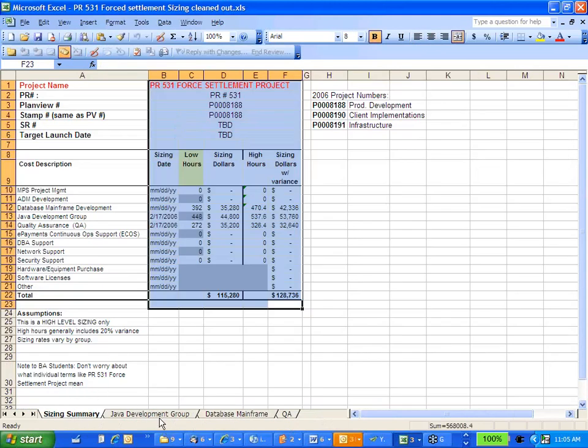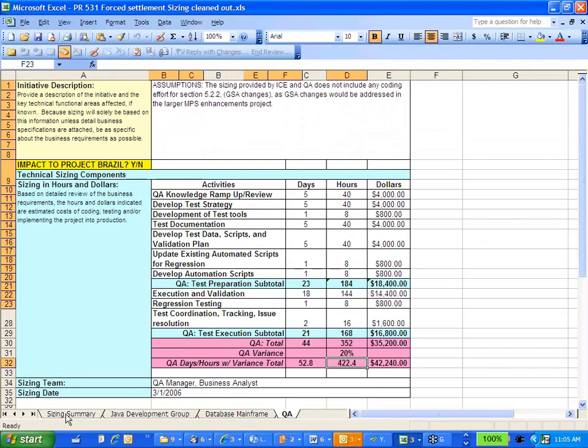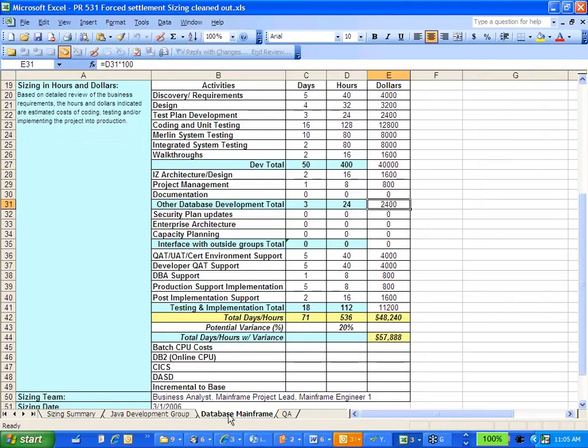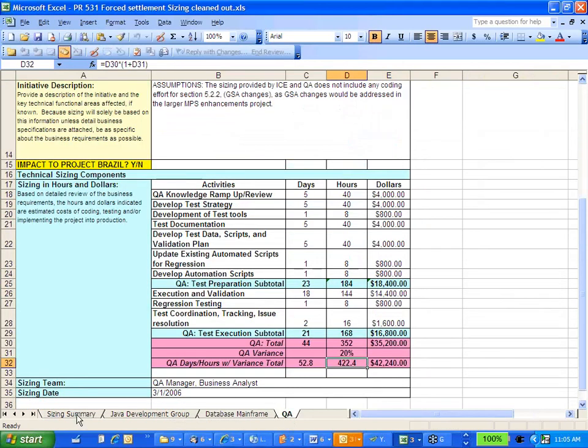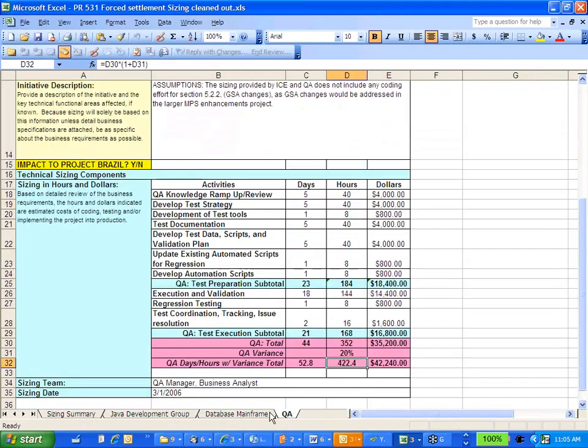document. Because generally speaking, the executive sponsor of the business team is not looking for this level of detail. They don't want to get their head all messed up. They just want to see, okay, thank you for this number. This is our low number, and this is our high number with variance. So then they can say whether they want to go through with this project or not. In case they ever come back and question you, like some people will, how did you come up with these numbers? Then you have this background research, so that they know that you didn't just pull this number out of thin air. They look at the due diligence you've done.